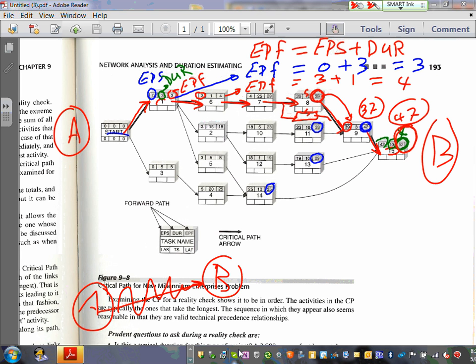And in the contract, guys, most of the contracts include war. I don't know if you ever read the contract. They say this contract is valid, but excludes wars and natural disasters. Because you're delivering something, you don't know if there's going to be a tornado that hits your plant or whatever. So they exclude natural and man-made disasters in all these contracts. But if there's no tornado or no man-made disaster, you're expected to deliver, buddy. Or strikes. Sometimes what they do, Derek, they exclude labor strikes, because labor strikes in the past have screwed up certain projects. So they exclude this one from their contract.